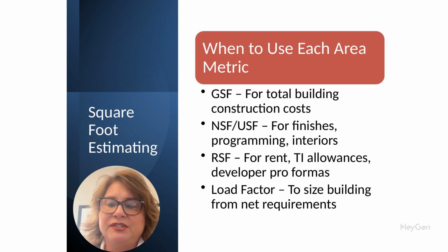If it's for structure and systems, go with GSF. If it's for fit out finishes, use NSF or USF. If it's a leasing or TI budget, use RSF. And if you're trying to move between usable and rentable, apply the load factor. These distinctions are subtle, but incredibly important to producing accurate and defensible estimates.